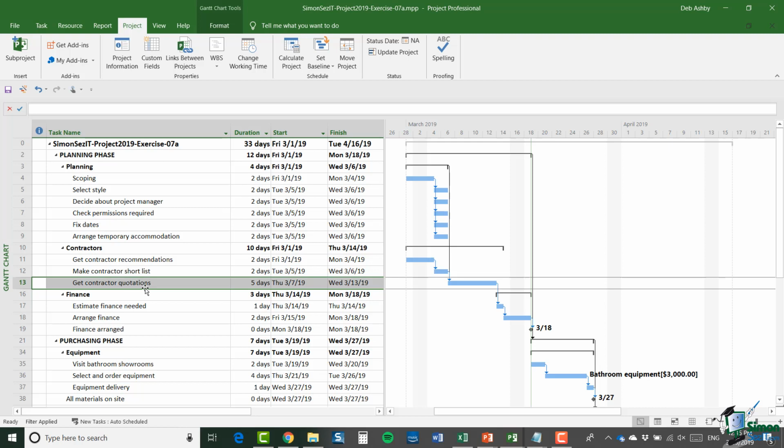However, during the second week, there is no progress at all on anything. So let's imagine that I'm sick and I'm confined to my bed and I don't do anything about anything. So when I come to update for the second week, so in my case that would be March the 15th, I just need to reschedule everything to start the day after the end of the second week. So during the second week, no progress at all. I'm basically going to reschedule what's left.